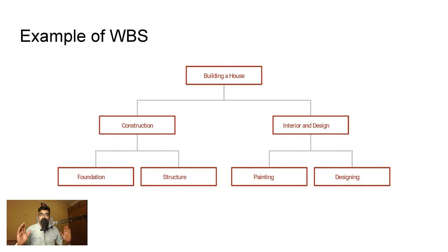But for the purpose of this particular video, let us consider foundation is the maximum that we can break down this particular structure or this particular project. A point where there cannot be further decomposition possible is when that particular item becomes a work package.